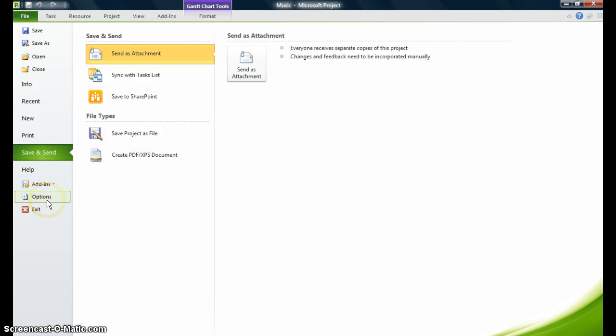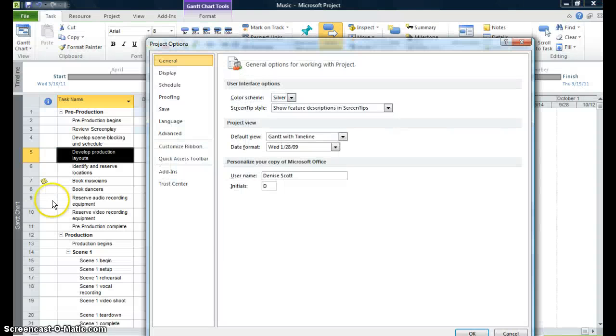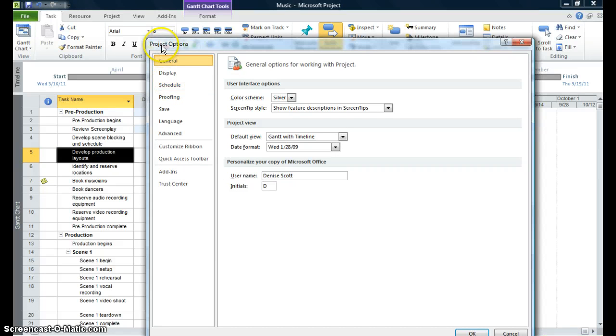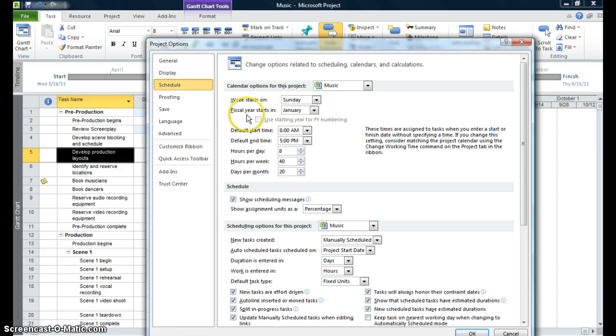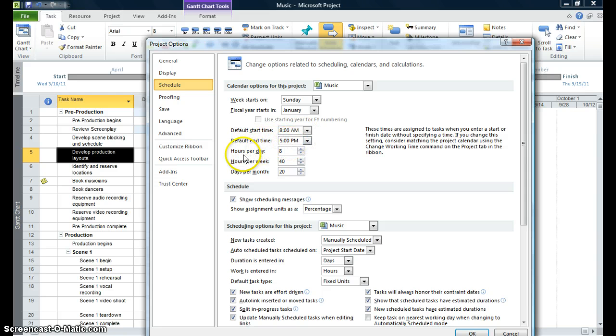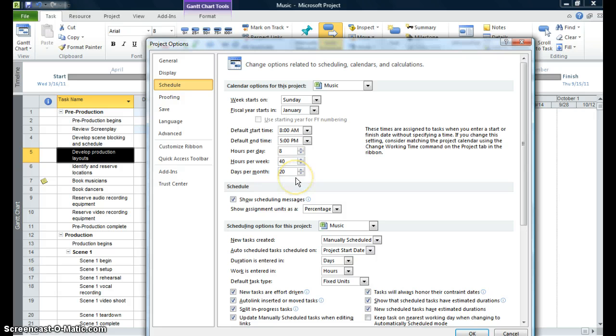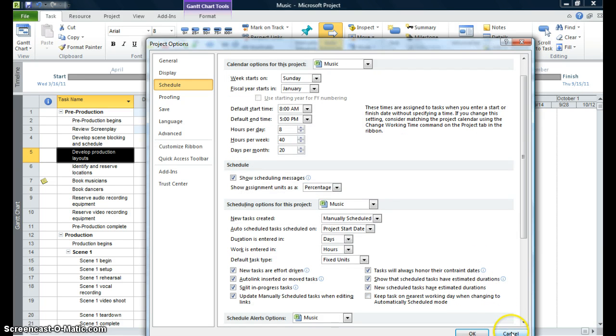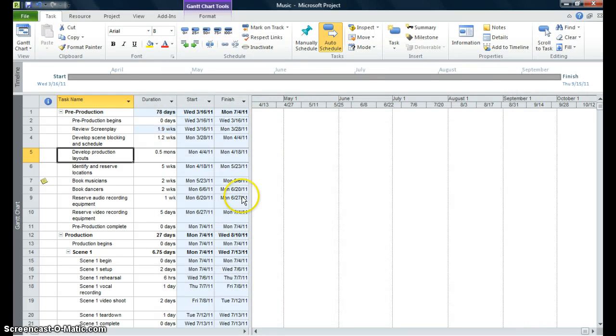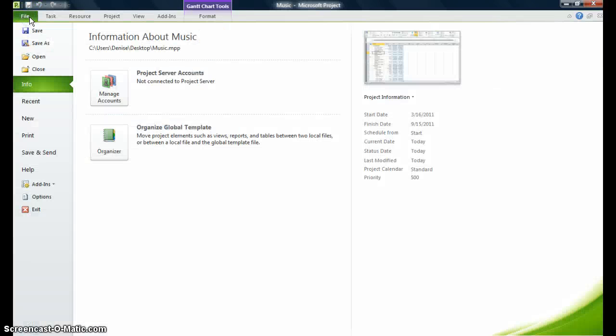And I have my options as well. This brings up the project options display box. I can click on schedule and I want to just make sure that the week starts on a Sunday, which is the default. The fiscal year starts in January. The default start time for my project is 8 a.m. The default end time is 5 p.m. Hours per day are 8 and the hours a week are 40 and the days per month are 20. These are all defaults and that's fine, but if you need to change these, you can go right ahead and change that information. I don't need to change anything in this area, so let me just click on cancel.